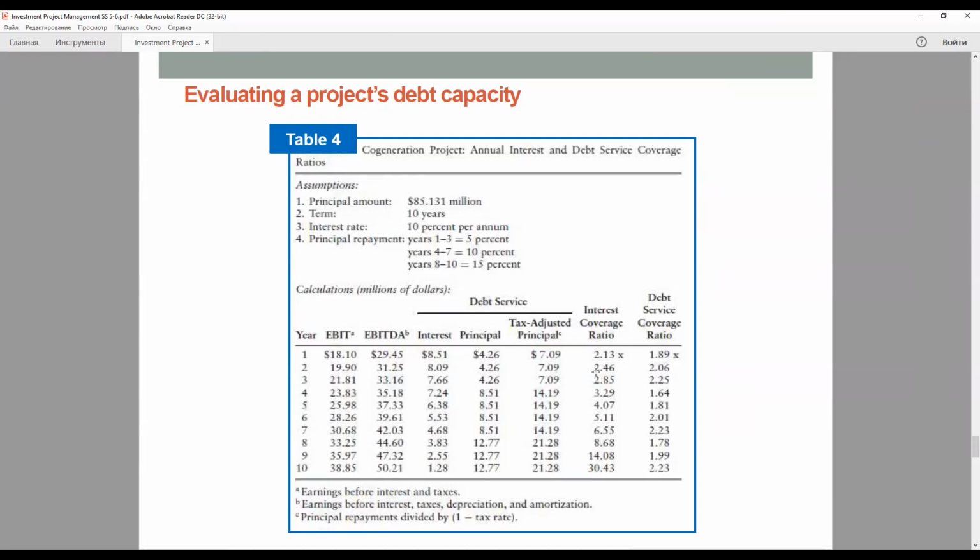Interest rate risk. If the debt incurred for a project bears a floating rate of interest, rising interest rates can impair the project's coverage ratio. A different form of interest rate risk also exists. At the time a project is initially financed, floating rate bank debt is often arranged to cover construction costs.